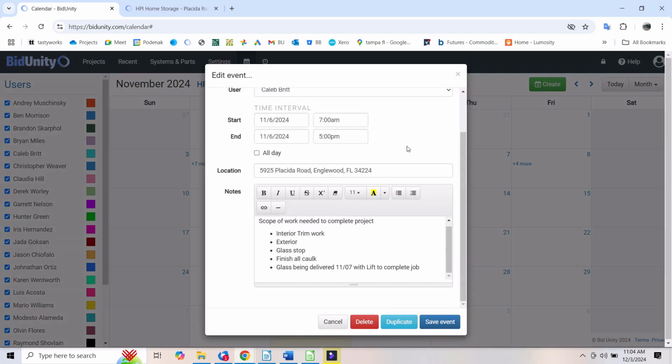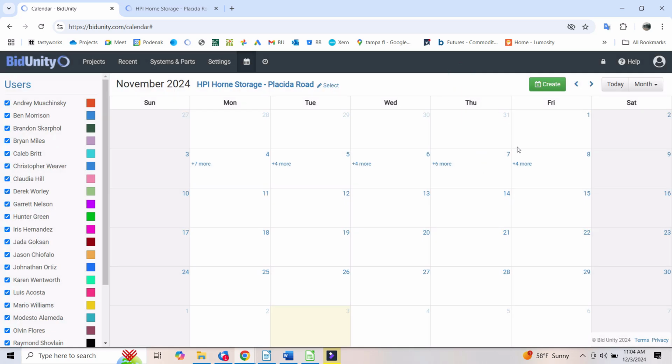That's when we do something that the owner would notice. It would be like putting in a window where the window wasn't there before. The standard for this is not that we go back and adjust the door closer. It's doing actual construction work that somebody would notice that we did something. So I'm going to consider our completion date November 8th.